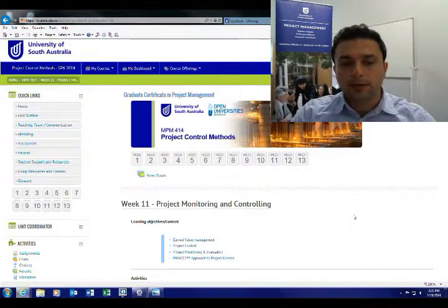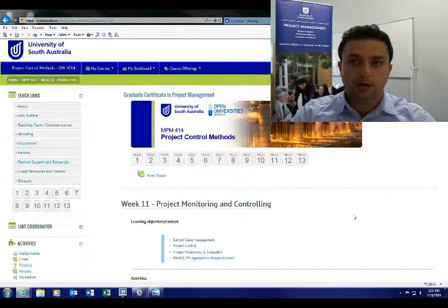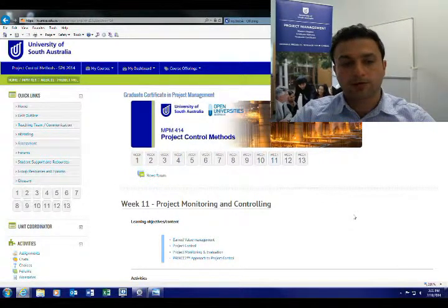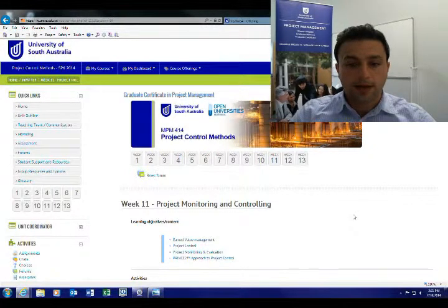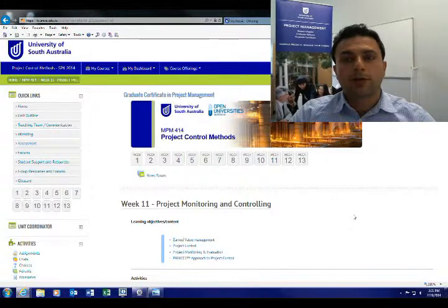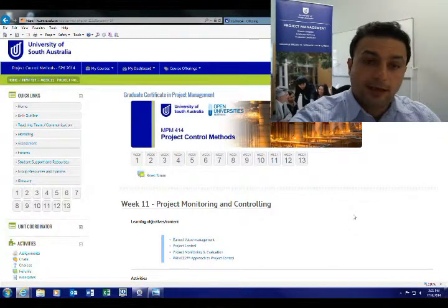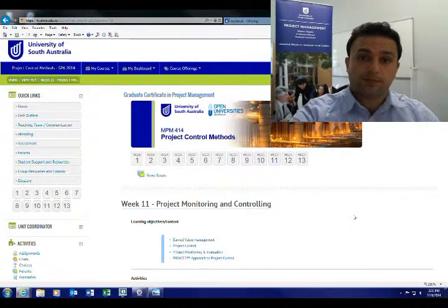Using this method, you could easily be on time but overspent. To avoid that scenario, using earned value is more accurate and more reliable, because it integrates the cost, time, and work done, which is the scope, and can be used to forecast future performance and project completion date and time.